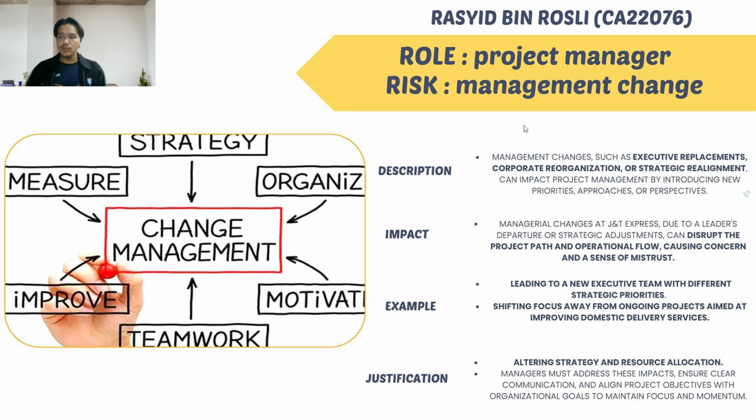Project goals are negatively impacted by the delay in the decision-making process and the need to adjust to the organizational environment. One crucial project might be rearranged or dropped entirely in favor of new endeavors that better align with the currently announced company goals.